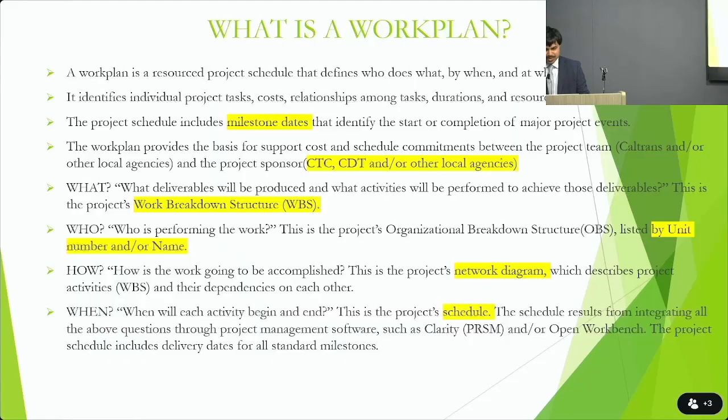All right, work plan. As I said, this is not our focus, but the work plan has two major elements. One is schedule, another one is budget. So how is the work plan developed? During the bid process, the work plan is developed. During the bid process, you collaborate with all the functional units who are going to be involved, and develop a schedule and develop the budget needs. That is our work plan. And then we try to adhere to the timelines and the budget needs that were developed during the bid phase throughout the next 4 or 5 years of the project delivery.